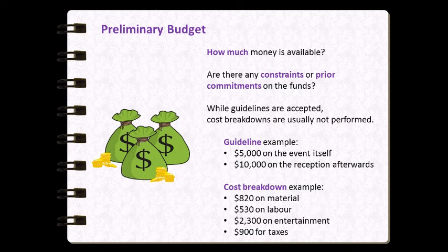Now let's move on to the project charter's budget section. The project charter's budget is a preliminary high-level budget. Remember, no planning activities have yet begun on the project — the project manager has only just been brought on. So allocating funds to specific activities or tasks is not possible at this point; that comes later in the process. At this point, we're only looking to determine what the overall budget is and whether there are any pre-existing constraints on those funds. For example, money may have already been allocated to a specific division within the company, a specific vendor may have already been selected, or a supplier may have already been selected that the project must use.